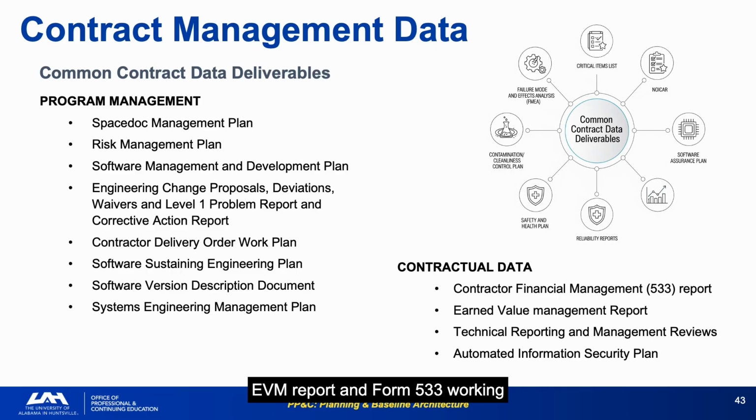EVM report and Form 533 working together give you cost performance against plan. Without both, you have either the financial actuals, 533, or the performance measurement data, EVM, but not the integrated picture. Know which of these deliverables your contract requires, when they're due, and what your program office's process is for reviewing them. Late deliverables often signal contractor financial management problems before the financial problems show up in the numbers.